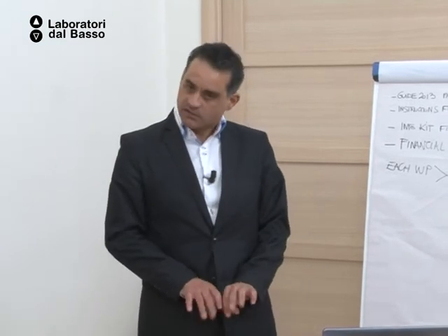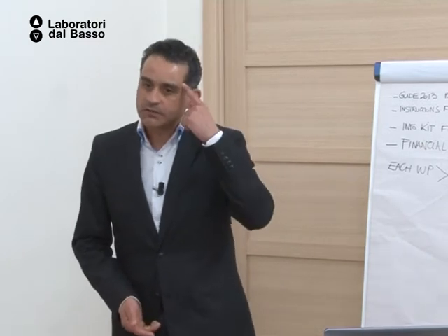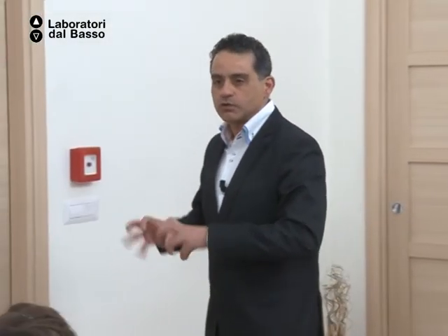One of the projects I've been working with was not approved because they considered too much money was given to the management work package. They said, are you guys bureaucrats? Are you going to do a project or are you just going to manage? We were not reasonable. We missed the point. We should have put more money on the work package, on the activities.